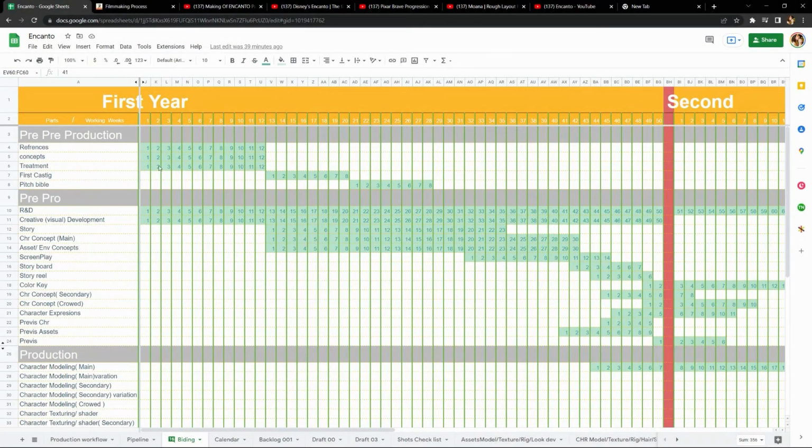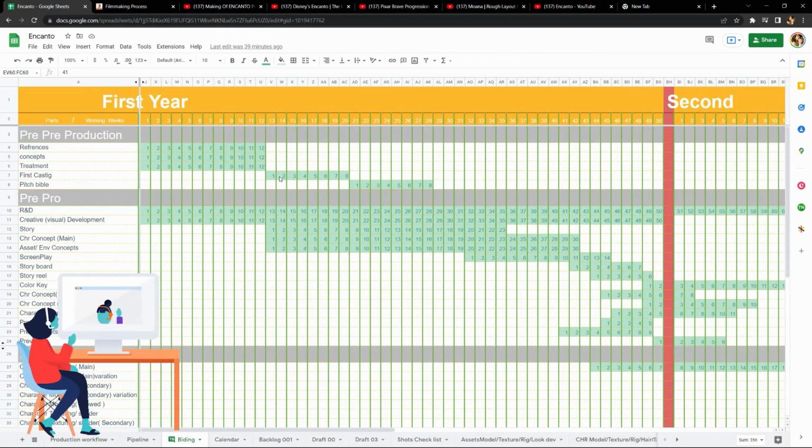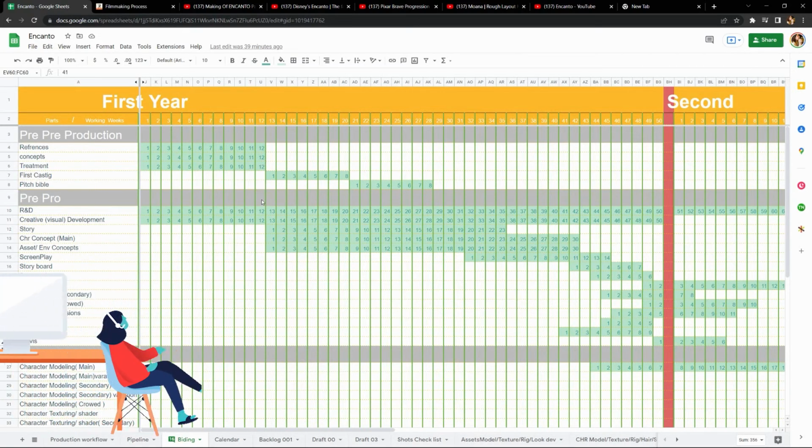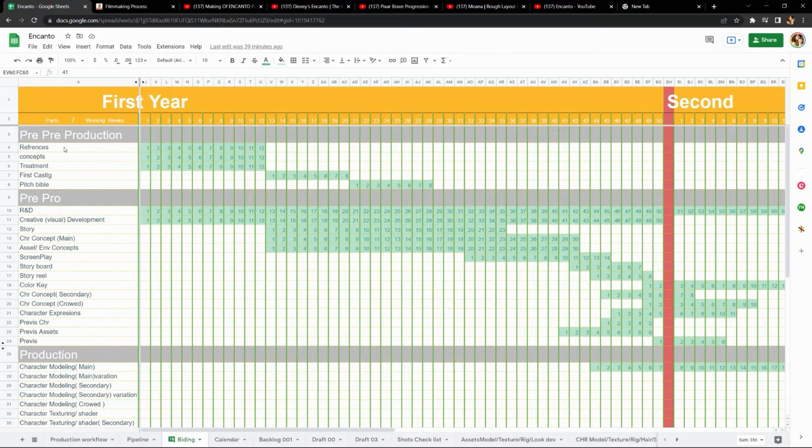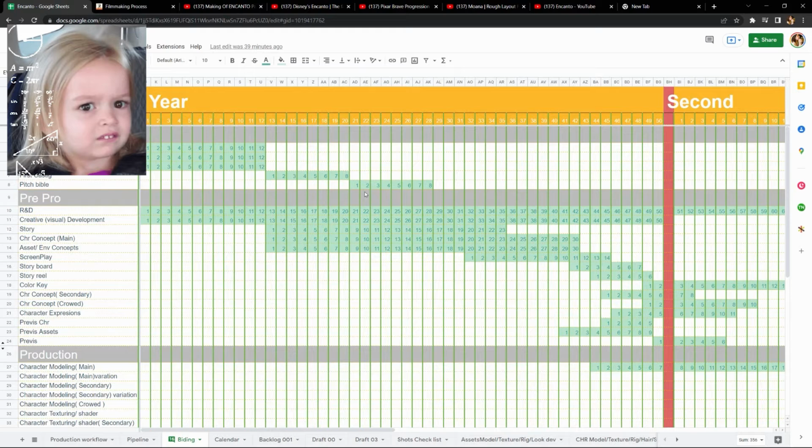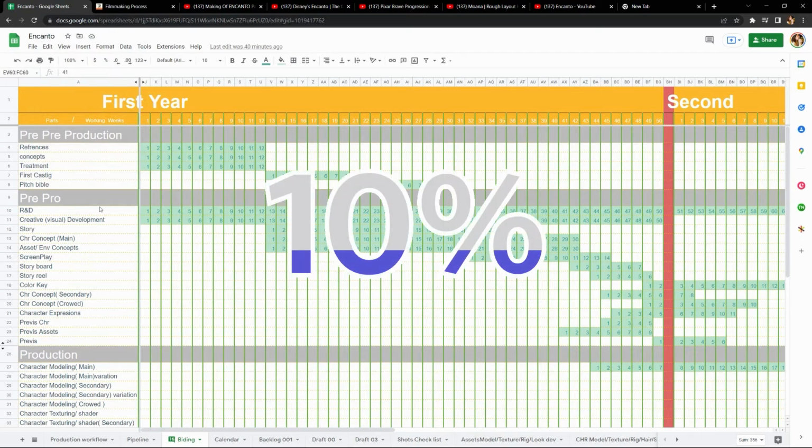This is the bidding table. When you have a story, you will make a table to give you a vision of the project. After having many meetings with the client, producer, director, and heads, you will gather so much information which you should put in a table. Put every step into the table and ask your team for their estimation of doing any task and how many tasks you and the team guess you would have. Then add a contingency to them for making a table.